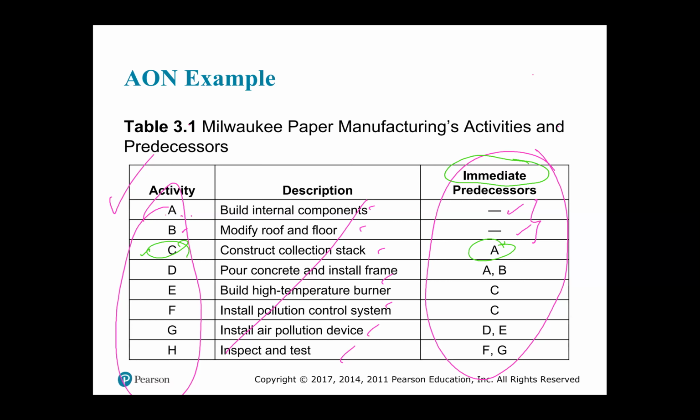No, you're talking about just the letter that comes immediately before P. It would be O. We would not be concerned about A, B, C, D, E, F, G, H, yada, yada, yada. Just what comes immediately before O for argument's sake, right? So at D, under the immediate predecessor, you see A, B.